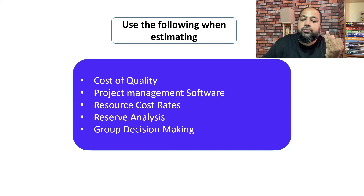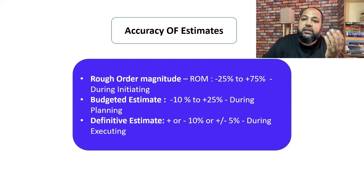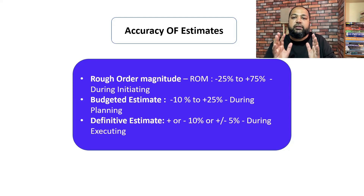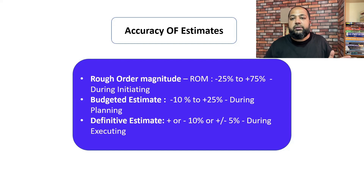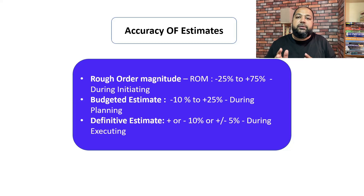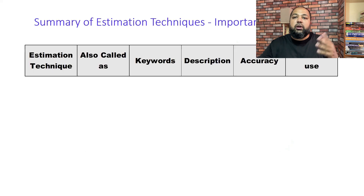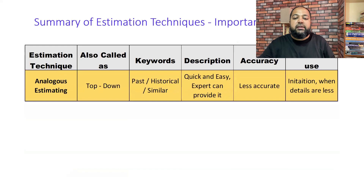Additional tools used when estimating costs include cost of quality, project management software for estimating resource cost rates, reserve analysis, and group decision-making. Regarding accuracy, there are three types of estimates: Rough Order of Magnitude (ROM) estimate with a range of -25% to +75%; budgeted estimate with a range of -10% to +25%; and definitive estimate with a range of -5% to +10%. ROM happens during the initiating phase, budgeted during planning, and definitive during execution. Bottom-up estimating is common for definitive estimates.